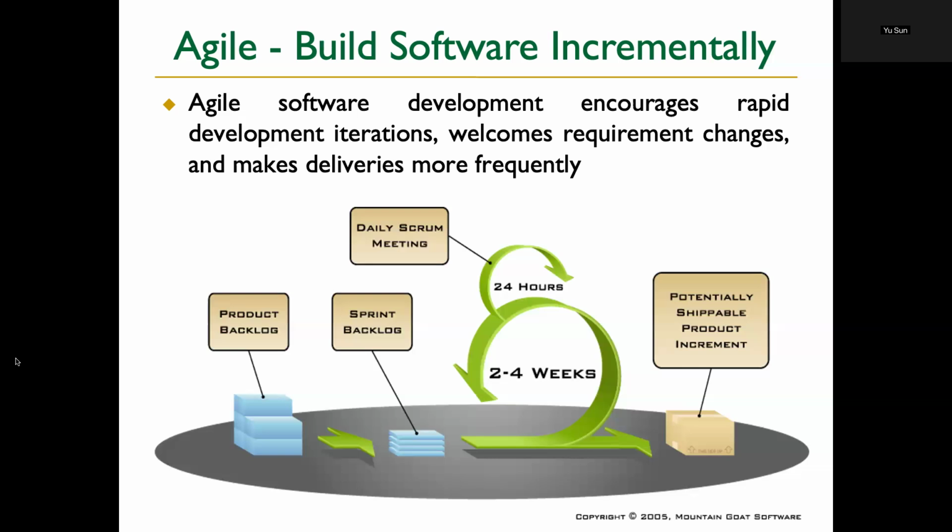However, remember, during those 2, 3, or 4 weeks, we want you to finish everything. It's not just the design. It's the coding, testing, deployment, everything ready. Although the software may not be complete, you may not have this button to click. This one's still great. You still see what we haven't implemented, but you can see this button, that button. And then at the end, we ship it.